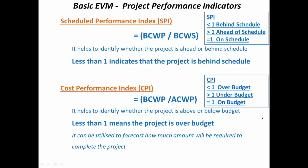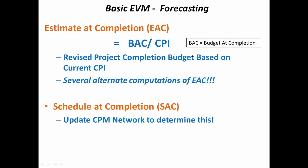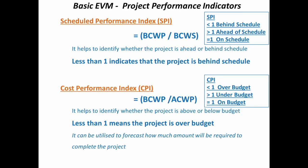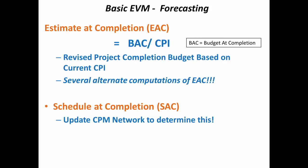One more critical parameter in earned value is forecasting. We should be able to use performance measures to forecast where we are going to finish. CPI gives the cost performance index; taking budget at completion (BAC) divided by CPI gives the revised project completion budget — the estimated cost at completion.